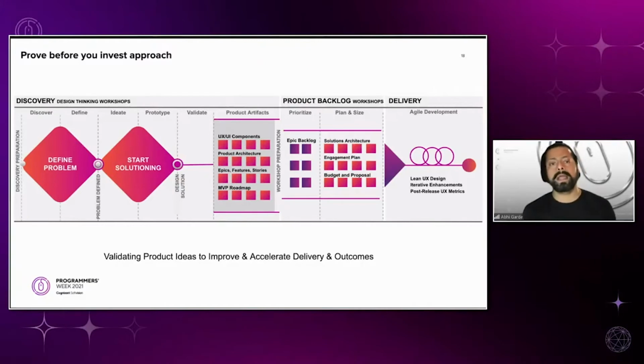Now it's just a matter of prioritizing the user stories. What features need to go out first? What will give us the biggest bang for the buck? When you do it this way, it becomes easy. If there is some overrun in one of the sprints, it is only the least priority user stories which get left out. Easy to move them into the next sprint. So sprint backlog planning becomes very easy.